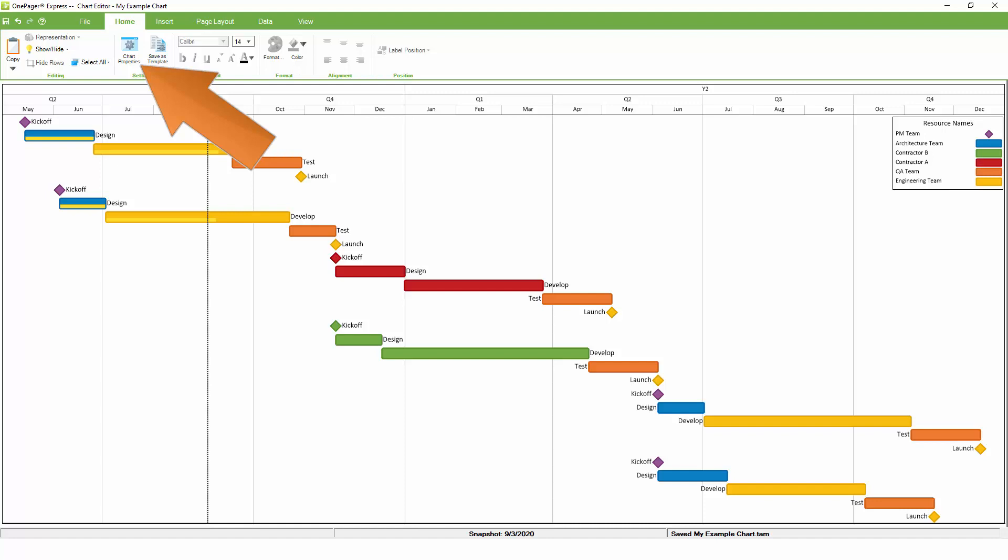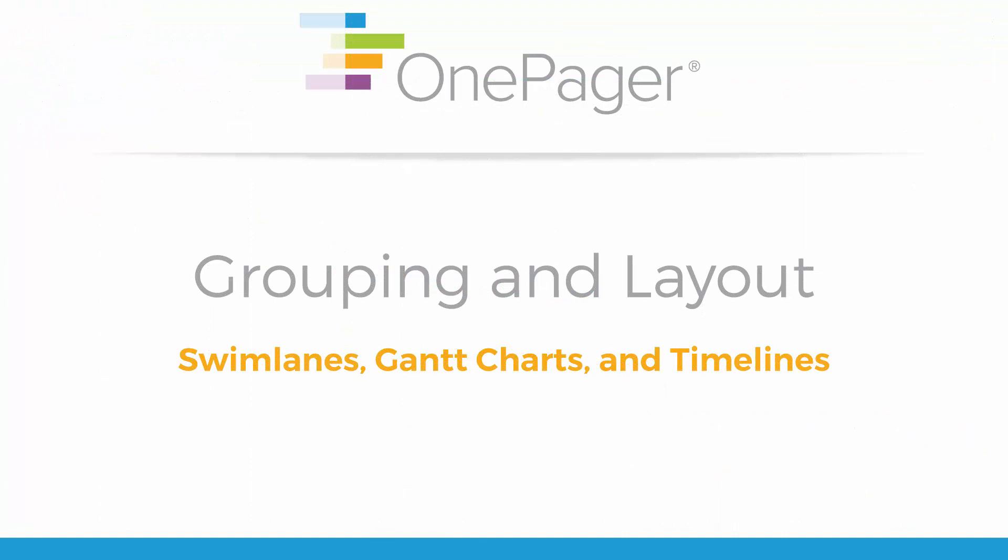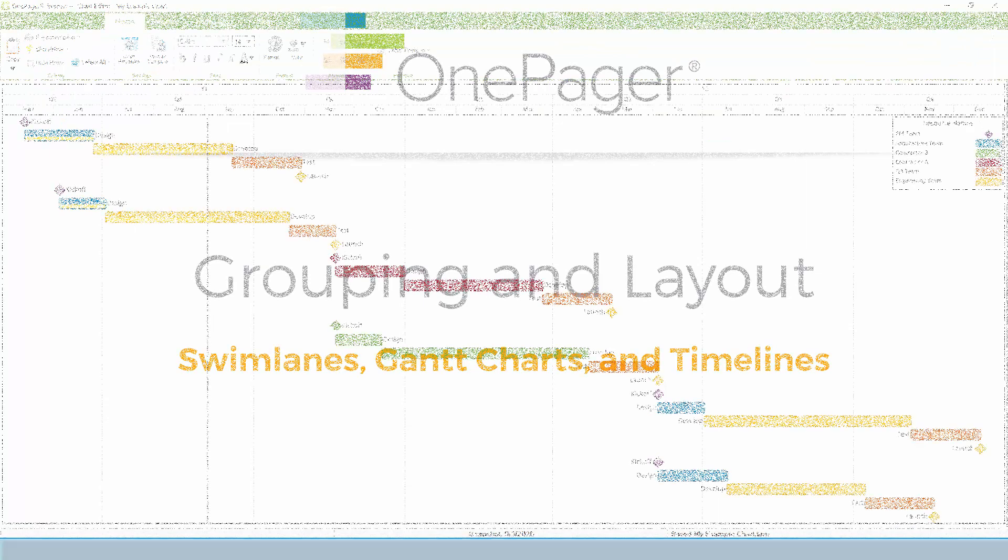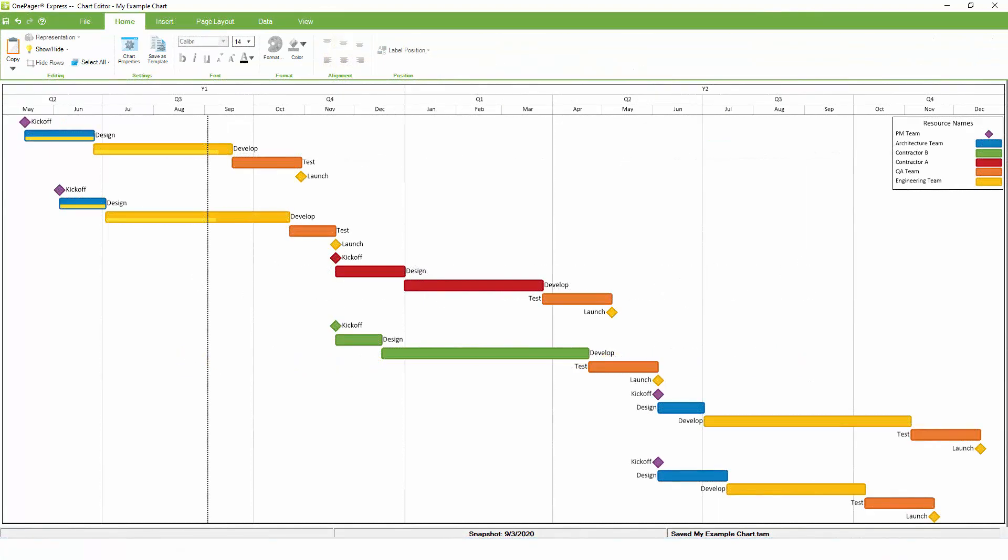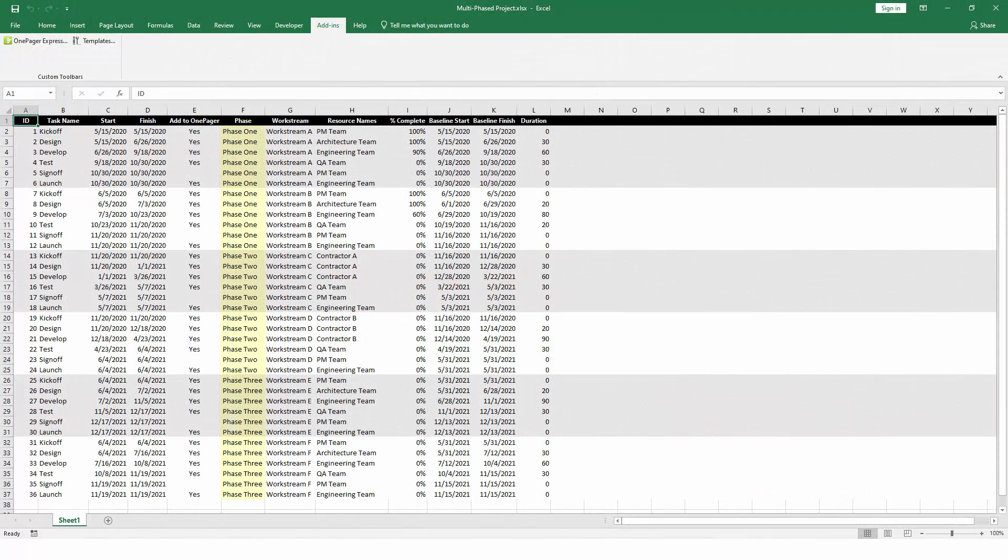We have a separate video that covers Chart Properties in more depth, so for this introduction, we'll cover the main highlights. One of the most popular features of OnePager are Swimlanes, which lets you group and sort your report into sections. Back in Excel, notice that we have a field called Phase where each task is assigned to a phase of the project.